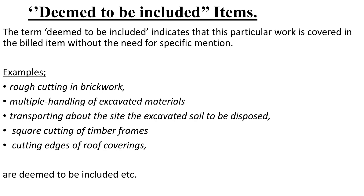The next item is deemed to be included items. These are items that we do not even need to calculate for them — they are already included. For example, rough cutting in brickwork: whenever we are calculating the cost of bricks, we have to include the rough cutting in brickwork automatically. These are items which are deemed to be included; they are just in the BQ, we don't need to state them separately. Other examples include multiple handling of excavated materials and square cutting of timber frames — when we mention timber frames that are square cut, the cost of cutting them into square is automatically added.